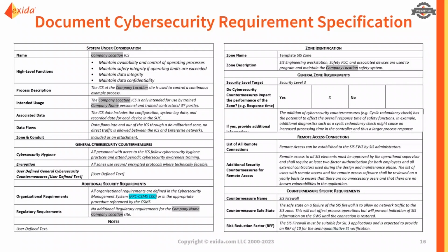It can be used for requesting vendor scopes, can be used as test case requirements and be the start of what you're going to build into, let's say, a CFAT and CSAT procedures. And so having this is one really good way to embed those requirements that come out of your cyber risk assessment into projects and into future steps that will be taken.